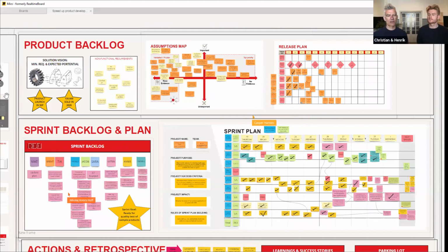Some is mechanical design, electrical design, software, different things. Within your area, which of those hot topics or hot assumptions should we act on pretty fast? And obviously those that are very important and where we have very little evidence, we need to act on fast. So we need to find ways of testing these, whether it's doing an MVP, whatever that is. It can be big things and small things, or just testing by doing calculations, having meetings with suppliers or customers, etc.